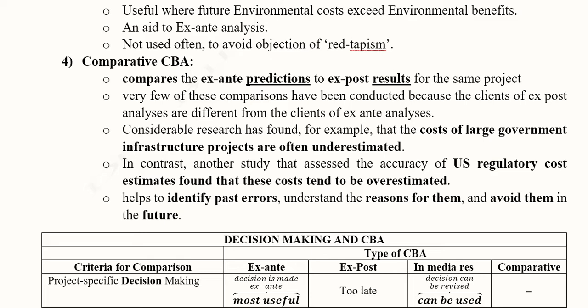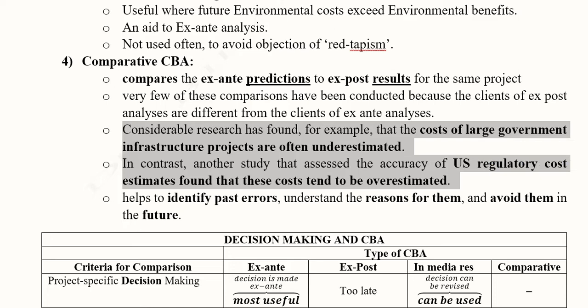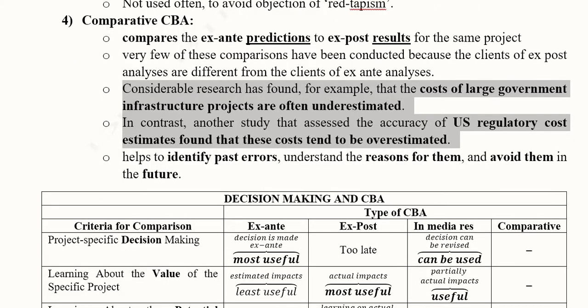Evidence from comparative CBA is mixed. For large government infrastructure projects, costs are often underestimated — expected given their magnitude and complexity. In other cases, such as U.S. regulatory cost estimates, costs have been found to be overestimated. Comparative CBA helps us identify whether underestimation or overestimation has occurred, highlight past errors, understand their reasons, and avoid them in future projects.